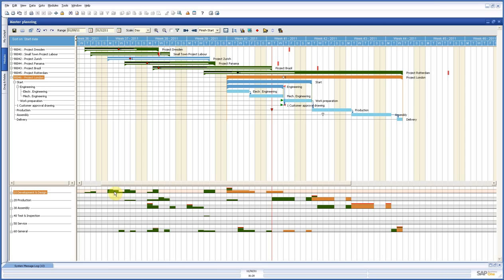Now, if you see from the project above that they need capacity, it's shown here like this with the green colors. If it's an active project, like here you see that brownish color, you can see exactly what capacity you need for that specific project. And if you have any problems, like here, there, it turns out red, and red says you need more capacity. And how you do that, that's your case, because you're the planner.